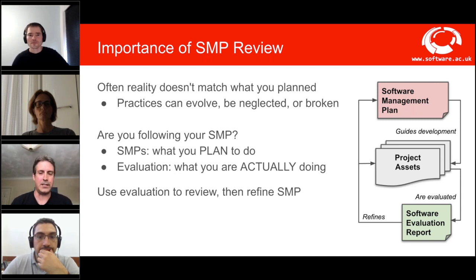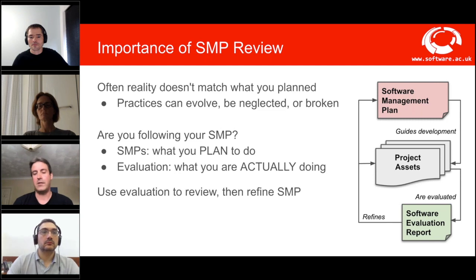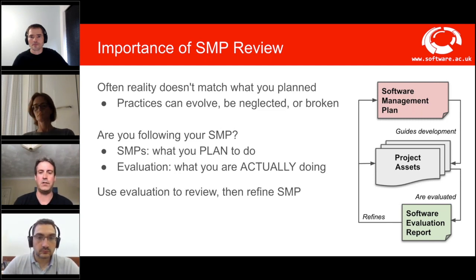So to help here, tasks such as software evaluation have an important role to play with software management plans. Whereas software management plans are an intention around what you plan to do, software evaluation is a way of finding out what you are actually doing. And so software evaluation can help with delivering your SMP and also assessing and adjusting it where necessary to improve it as you move forward. And so an SMP should be revisited, for example, every 3 to 6 months, or perhaps annually, as long as it's a defined time that's suitable for the project, with a revision creating a new version of that SMP.